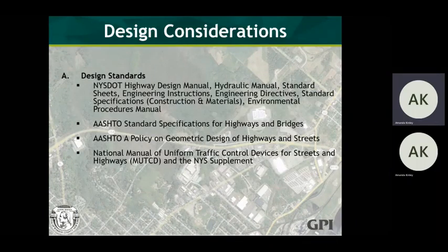This is a locally administered federal aid project. It's locally administered by Warren County. It is also reviewed by New York State DOT. Because of this, we need to uphold specific design standards to make sure that we are using the standards necessary for the funding sources. These standards include the New York State DOT Highway Design Manual, AASHTO, and MUTCD, to name a few.